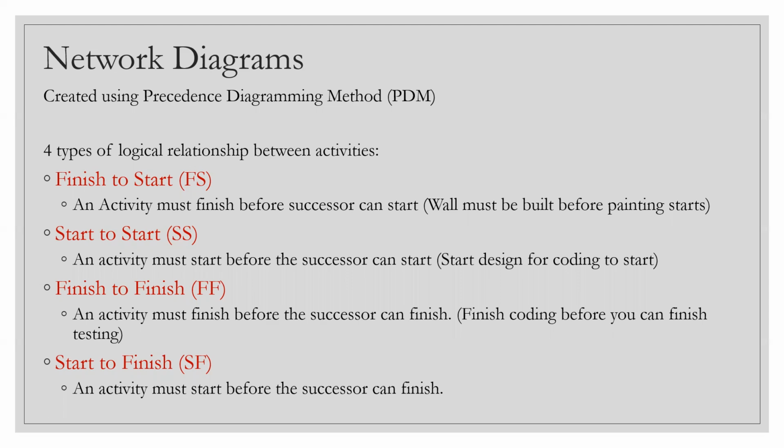So in our case, the requirement capture has to be completed before the design phase can kick in, right? Here I'm saying the wall must be built before the painting starts. So that is finish to start, the most common one. Again, in the exam, if the logical relation between two activities is not given explicitly, remember you are going to go with the default one, which is finish to start. The remaining three are used, and the last one is very, very rare. The second one is start to start.